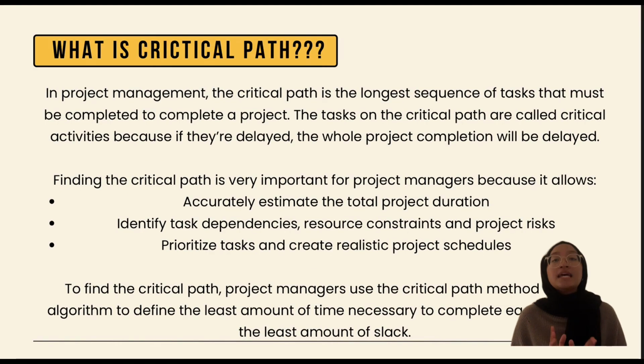So lastly, I will explain about critical paths. What is critical paths? In project management, the critical path is the longest sequence of tasks that must be completed to complete a project. The tasks on a critical path are called critical activities because if they are delayed, the whole project completion will be delayed. Finding the critical path is very important for project managers because it allows them to accurately estimate the total project duration, identify task dependencies, resource constraints, and project risk, prioritize tasks, and create realistic project schedules.